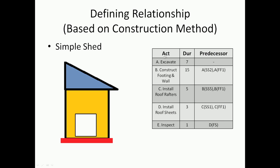This is the representation we have discussed. If you look at how the shed is constructed, you might say you do not want to overlap and will do all excavation, all construction of footing, then the wall, then install - but obviously that would take a lot of time if we did every activity serially. That is why we want to start this in a parallel way. If you were going to do the same setup using activity-on-node with just finish-start relationships, you would end up with a serial set of activities.